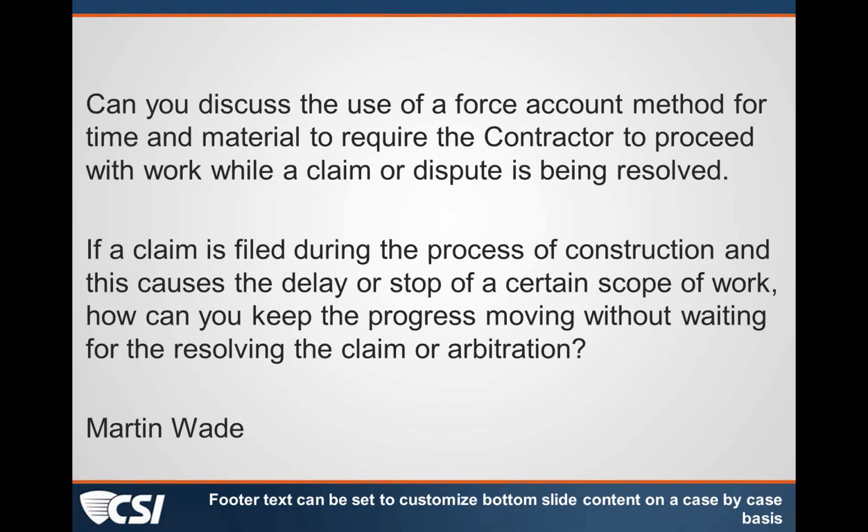One of the things that came to my mind is that in using this method, you certainly can encumber a lot of work on the firm, either the engineer or the architect, in trying to be sure that the information is accurate for time and material. The tracking of labor and accounting and confirmation of those charges certainly obligates you to more than maybe you anticipated in the beginning. So it's certainly a method that works, but it can have a big impact on the designer of record.